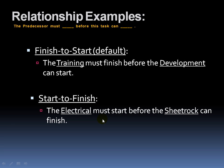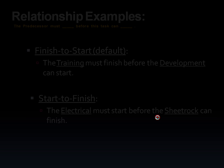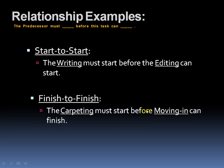Next is the start to finish relationship. Again, thinking of this sentence up above. The predecessor, electrical, must start before the sheetrock can be finished. Now let's think about that. When you're drilling holes through the 2x4s to string your wires throughout the house for electricity, you want to make sure that you start that before the sheetrock, the panels go up. Because otherwise you're going to have to punch holes through the sheetrock to be able to continue to string your wiring throughout the house. Okay, let's go to the last two.